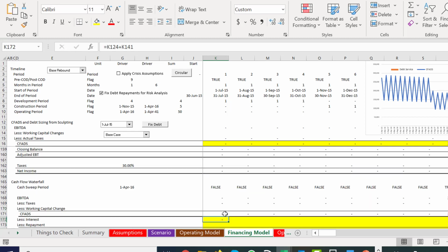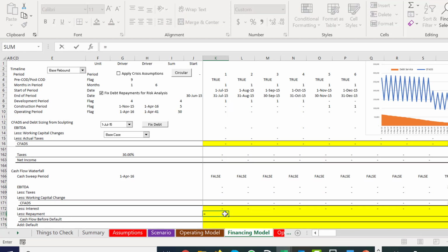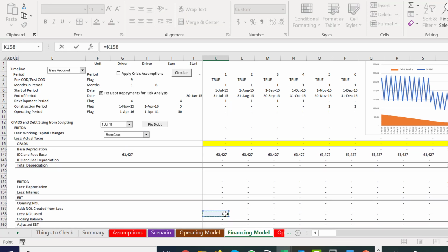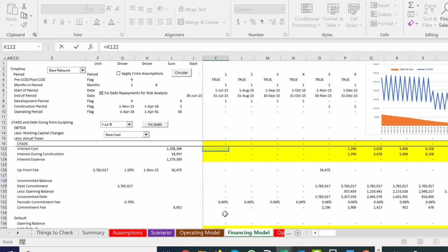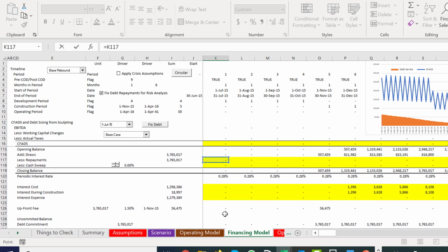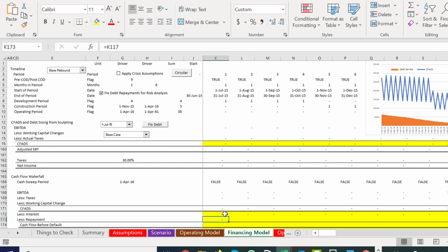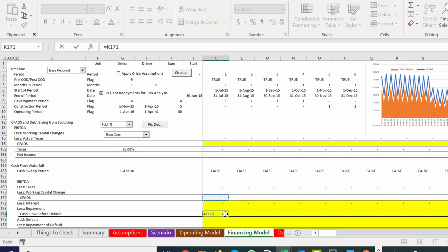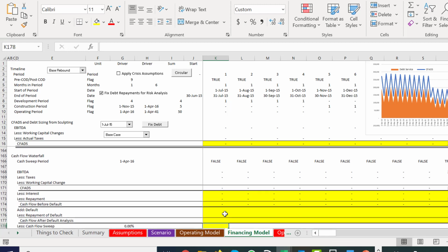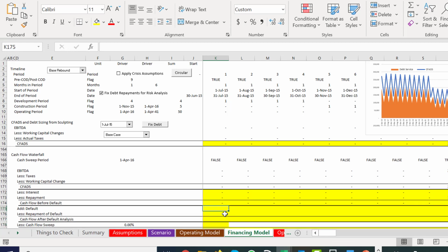And we really should find a nice little way. I use this SUMIF to start adding things. And then we can go up and get the repayment. And this repayment, we put some minimum stuff in here, and that's going to come into play a little bit later. So we can just take this repayment straight from here. So it's a little bit backwards, because that repayment you take from the debt schedule. The other ones you take, we'll show you in a minute, you take from the cash flow statement.